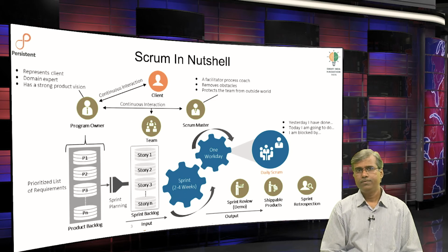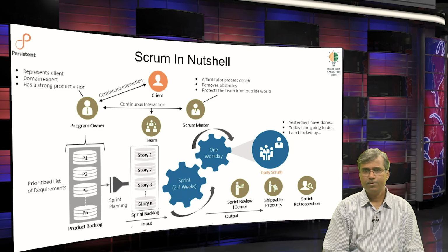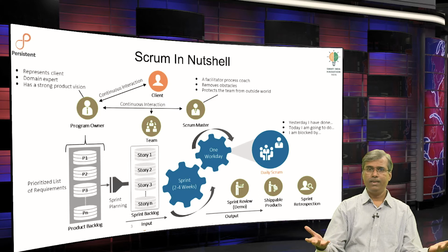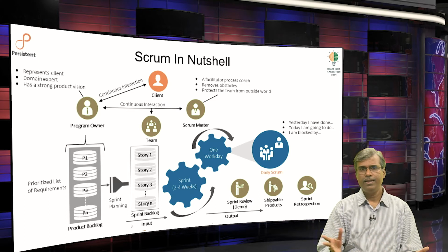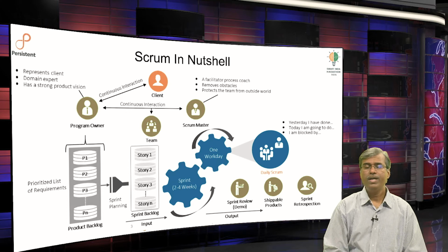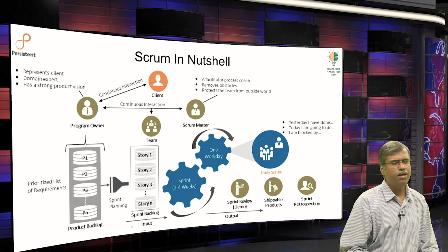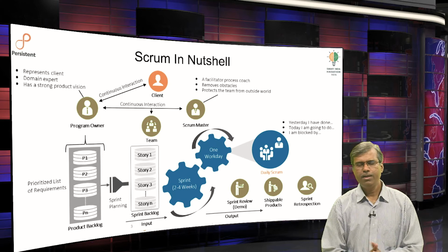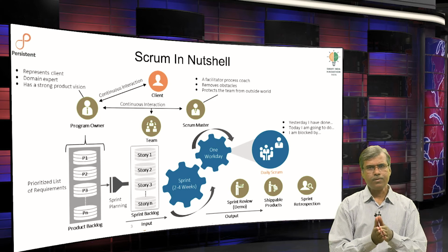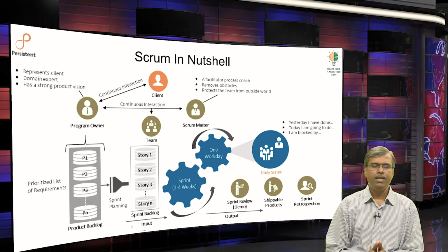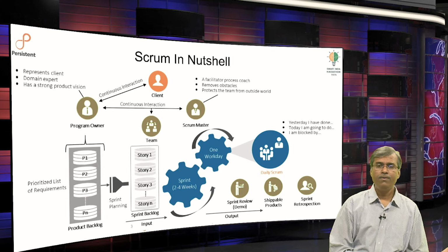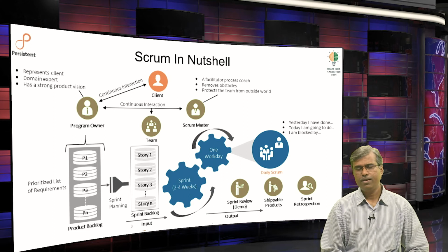But you know what? There is limited capacity available, and agile scrum teams are usually 5 to 8 people, not more than that, because then collaboration becomes very difficult, and not smaller than that, because then there is no opportunity to collaborate, right. So, such teams would then have to understand their actual capacity to deliver, and to arrive at the answer they will simply look at what they have delivered in the past, how many story points they could deliver.